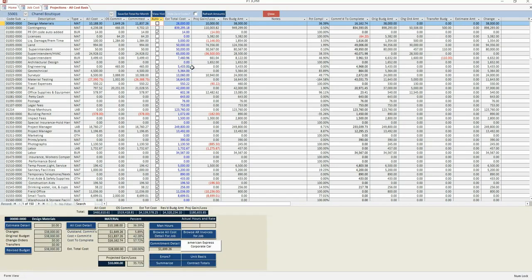Projections are automatic by default and will display the higher of all cost or the budget amount. Once the estimated total cost is entered, the automatic button will be removed and the auto projection will halt for that code. A projected gain and loss will then be shown.